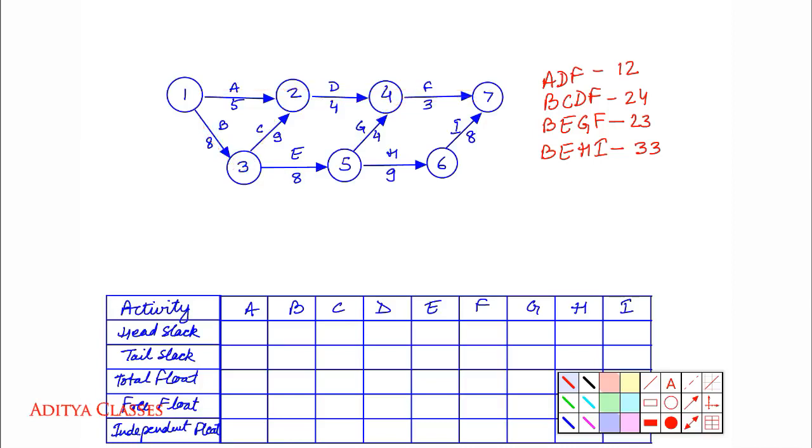So we have path ADF with duration 12, BCDF with duration 24, BEGF with duration 23, and BEHI with duration 33. Done with all the paths. Now, which one is the critical one? This path is the critical one, it is the longest path. So what we do? We should represent BEHI, the critical path, with a double line.